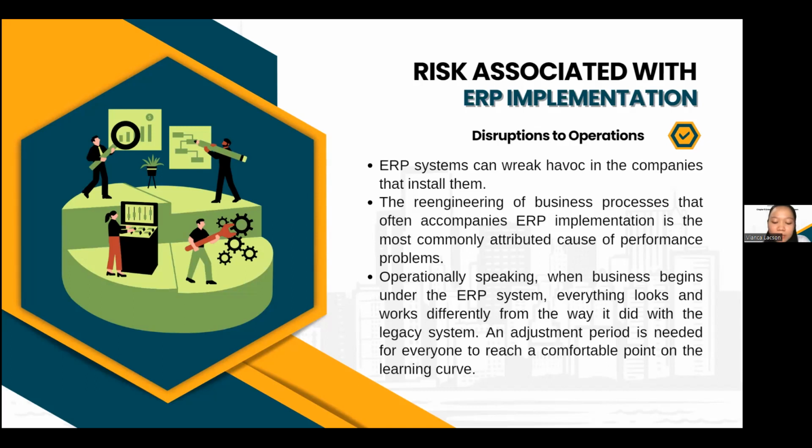So Hershey's problems have been attributed to two strategic errors related to system implementation. First, because of schedule overruns, they decided to switch to the new system during their busy season, when it is easier to deal with during slack business periods. Secondly, many experts believe that Hershey's attempted to do too much in a single implementation. In addition to the R/3 system, they implemented a customer relationship management system and logistics software from two different vendors, which had to interface with the R/3.